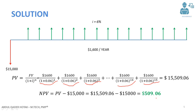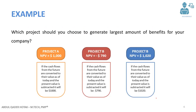Since this value is positive, it means that it's a profitable project. In the next question: which project should you choose to generate the largest amount of benefits for your company? Project A has an NPV of $1,000, Project B has an NPV of minus $790, and Project C has an NPV of $1,020. The higher the NPV, the more profitable the project is, so you will select Project C.